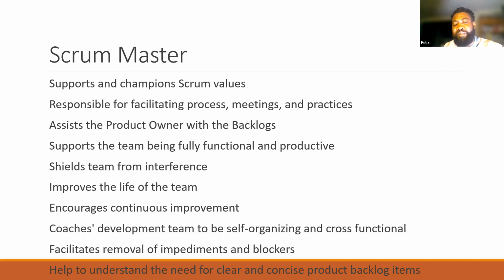And also as a Scrum Master, you could set up refinement sessions during your 2-week sprint, where you get the team together with the product owner to ensure that you have a ready backlog. So the team is always ready. We have ready stories to be able to pick up for the next sprint that you start. So basically, those are some of the responsibilities that you have as a Scrum Master.